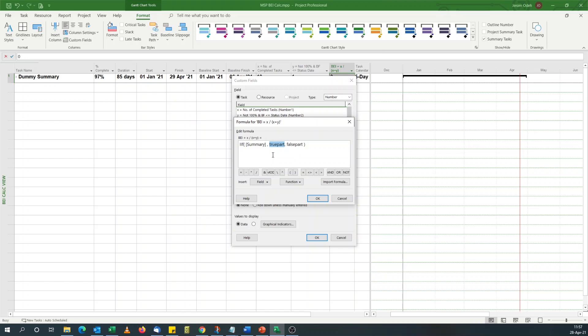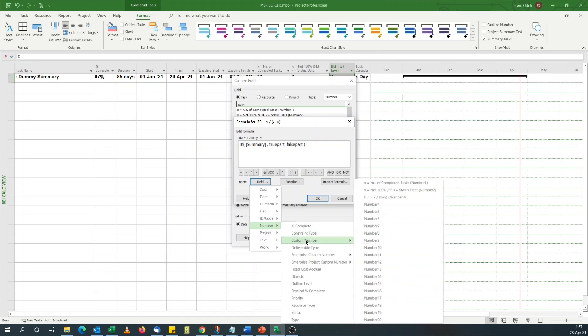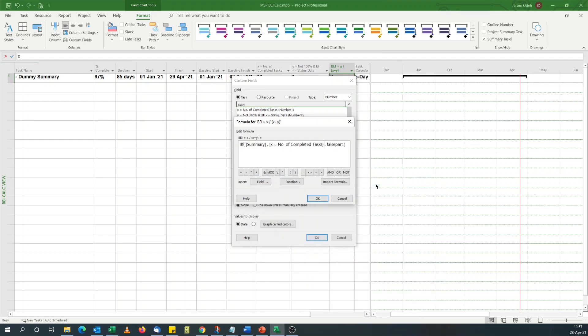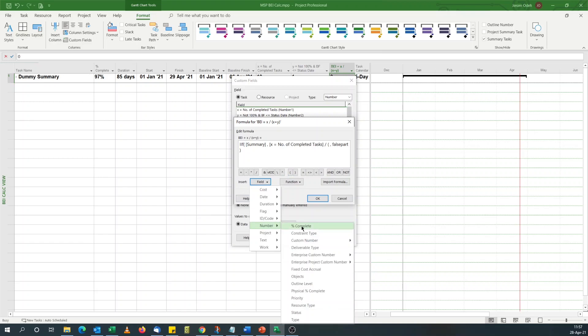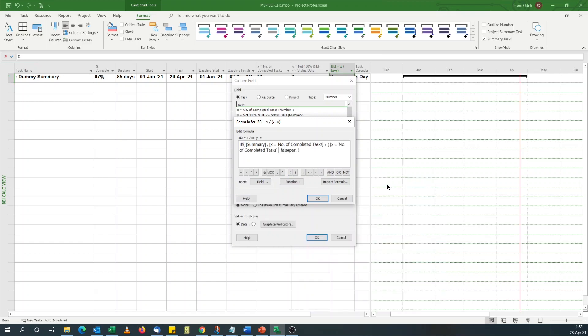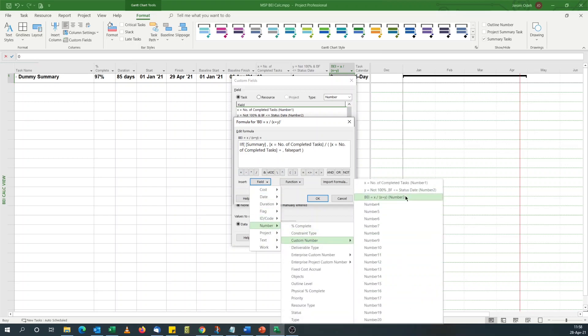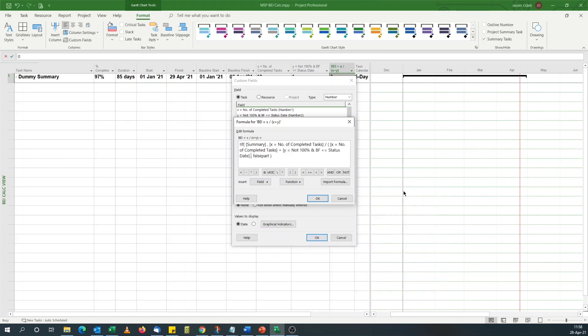So we do our X. Number custom field X. Divide by X again, which is number of completed tasks. Plus Y, which is baseline finish dates that are behind status date and not 100% complete. Close the bracket.